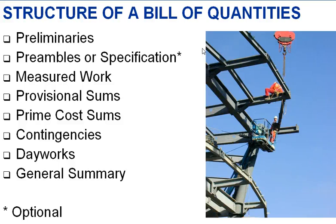Then we have the preambles or specification. Preambles would be an optional aspect, as nowadays this is being replaced by specification documents. So there will be the mechanical and electrical specifications, the structural specifications, specifications for furniture, the architectural specifications, and specifications for any aspect of the works.